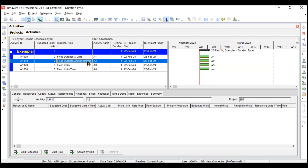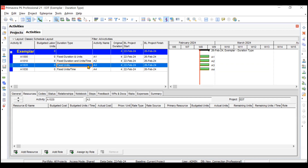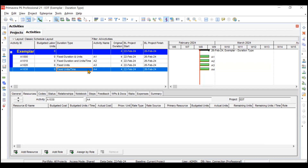For the second activity, your duration will be fixed and your units per time (hours per day) will be fixed for the resources. For the third activity, your units will remain fixed but your duration and units per time will change and vary. For the last type, Fixed Units per Time, your hours per day will remain the same for the resources — adding any number of resources will change the duration or the units.